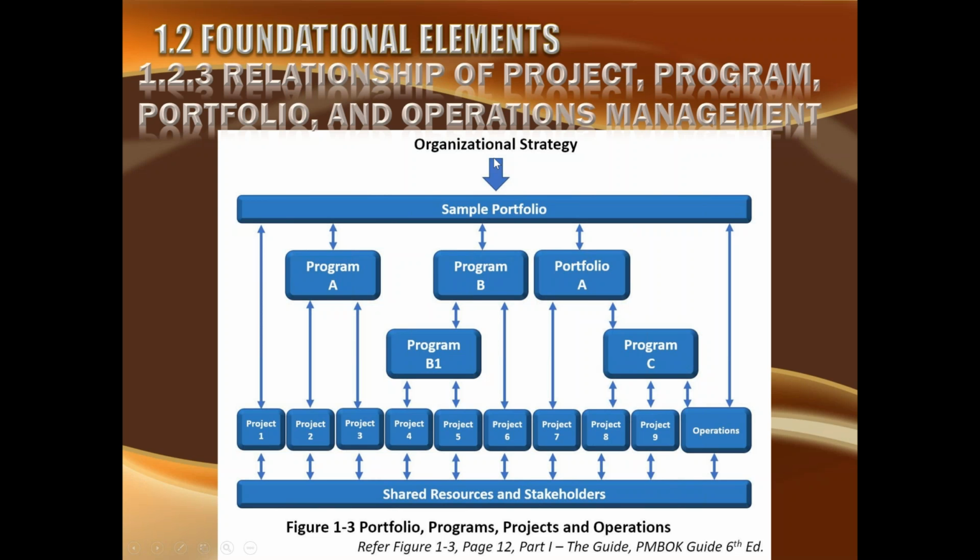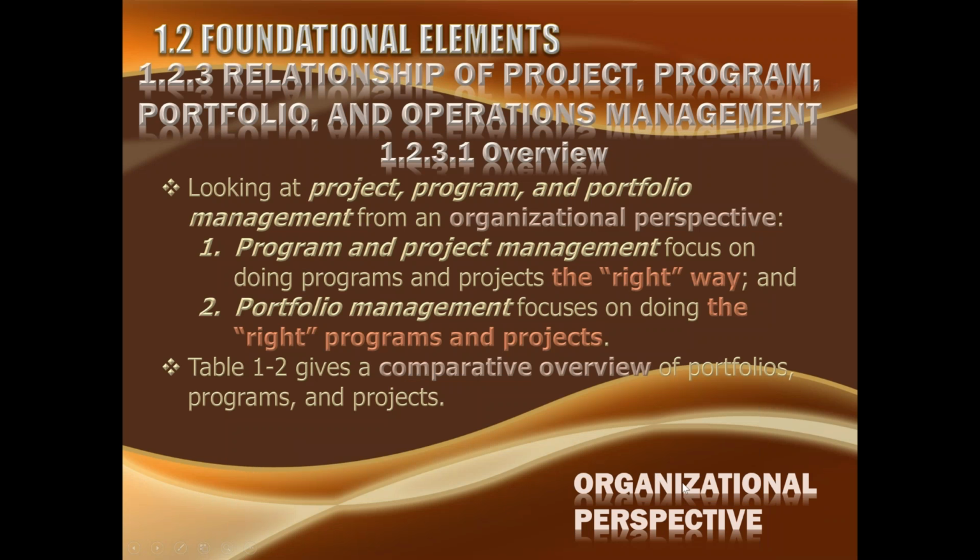If the organization changes its strategy, then the portfolio is the first to notice, and the portfolio will realign all its components according to the new strategy, and that may tantamount to killing some projects or programs and giving birth to new projects or programs according to the latest strategy of the organization. Okay, are you with me? Right. Wonderful.